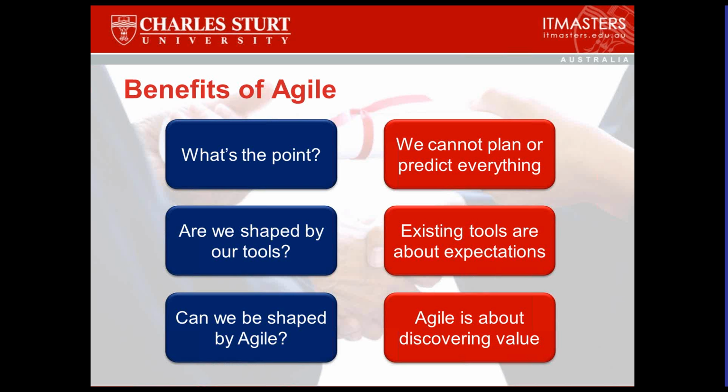So another question, how do you deal with constraints and or dependencies in Agile? Well, look at dependencies first, you do have planning about large-scale and small-scale sequencing. So it's not about saying, let's just throw a dart at the board and we're going to work on that first because that sounds interesting. Well, hang on. Maybe this other thing needs to be done first. You're not going to necessarily start building a user interface before you start building a database architecture.